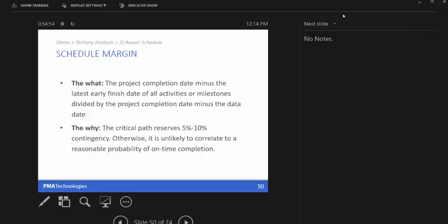If you had left the contingency activity in and just moved or redefined your project completion, would it do the same thing? Yep. Another strategy, yeah. Exactly. So now you can see here we have a nice green check. 57 days is about 8% margin for the schedule, which is nice. And if you look for critical, we have an indicator for critical activities. Pretty good. This is a recommendation, 15 to 30% of your schedule being critical. We're right there, 14%.